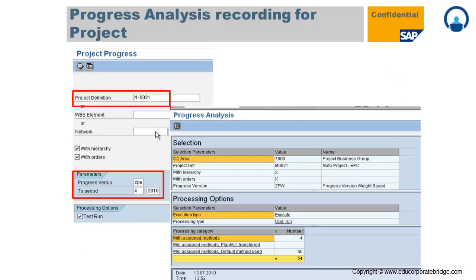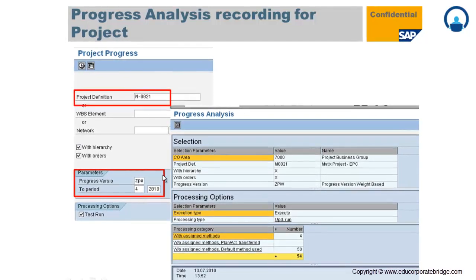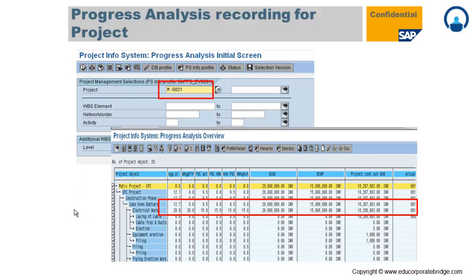For example, 15% actual completion against 20% planned is maintained. There is a transaction code CNE1 where you run the progress analysis for a particular project or WBS, specifying the period, method, and progress version. Running in test mode shows test results; unchecking test run executes the actual progress analysis. After CNE1, you run report CNE5 — the progress analysis report — which provides aggregated and non-aggregated POC, budget cost, work scheduled, budget cost work performed, project cost, and actual work done.